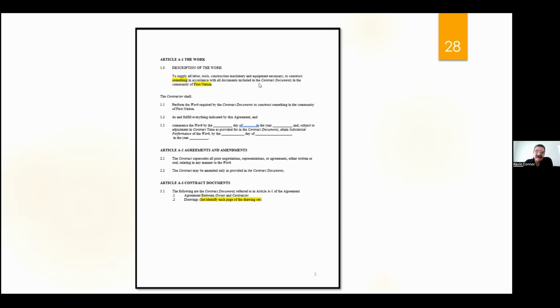And I have a lot of contracts or projects where the First Nation came and said, "Oh, we're going to charge you, oh my God, phone's ringing." So we're going to charge you $1,000 a day because you didn't finish on time. And again, you could put that in your contract, but it's not likely that a court will support it, and they haven't in the past. Courts will generally support actual damages.